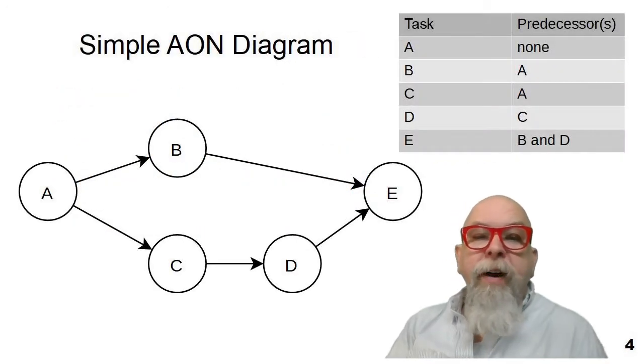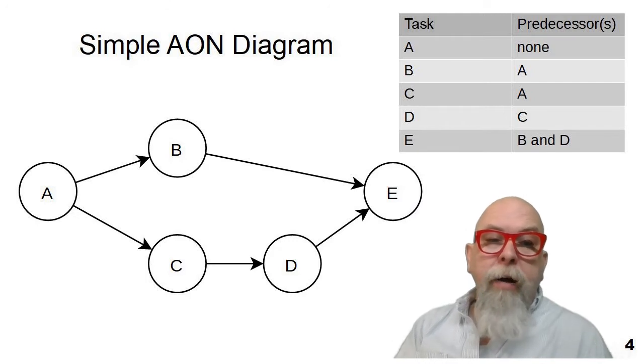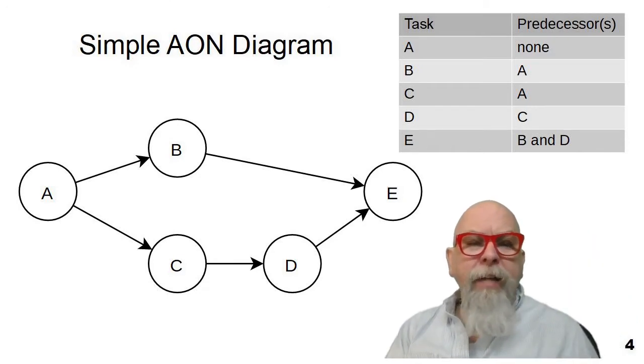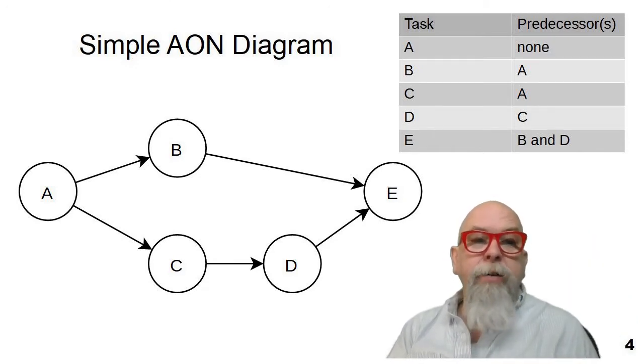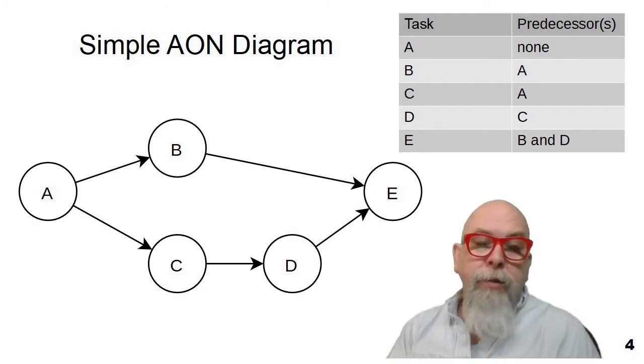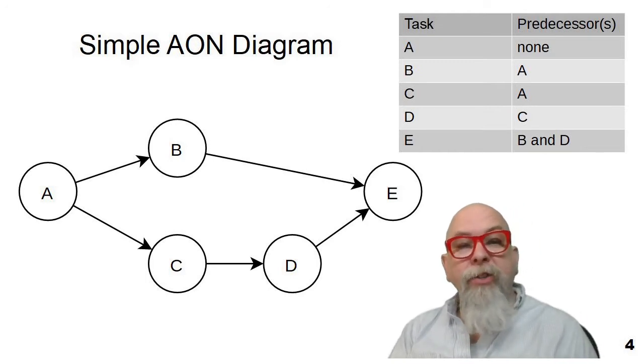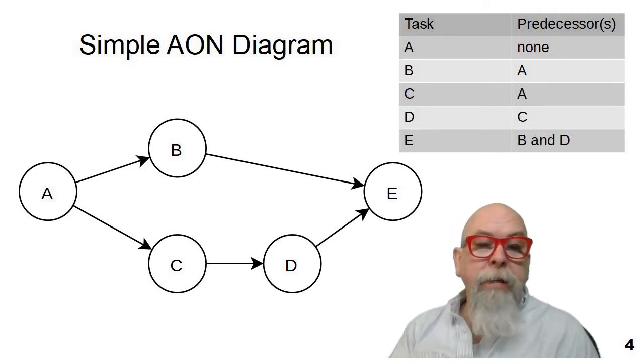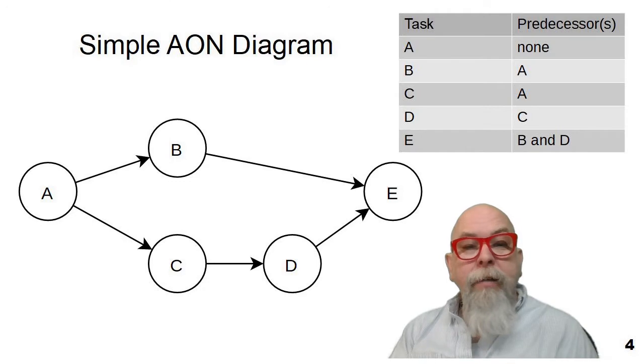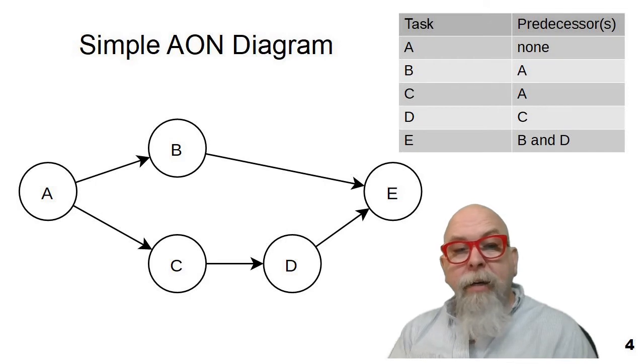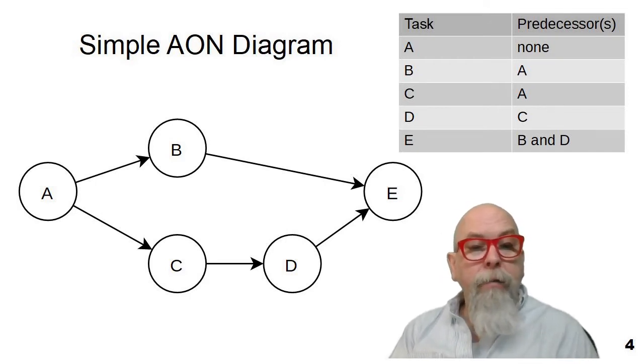Let's start with a very simple Activity on Node diagram. Above my head, you can see that we have a list of five tasks, and I've assigned each task a letter just to make it easy to understand the task. And I've defined the predecessors or prerequisites or tasks that have to be finished before we can start the next task. So you can see that task A has no predecessors and can be started at the beginning of the project. Tasks B and C must wait until task A finishes. Task D follows task C and task E follows task B and D.